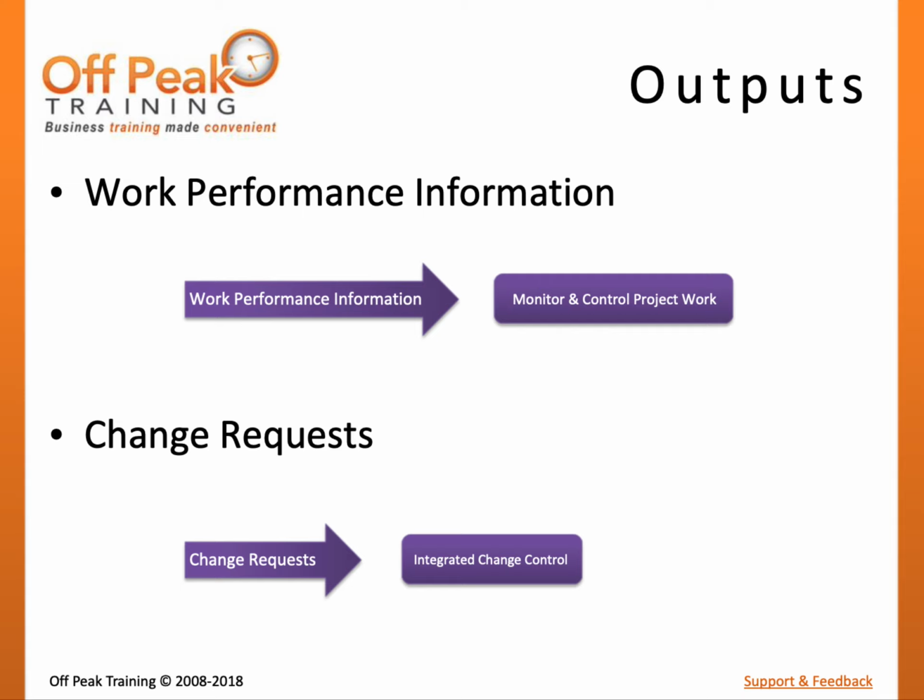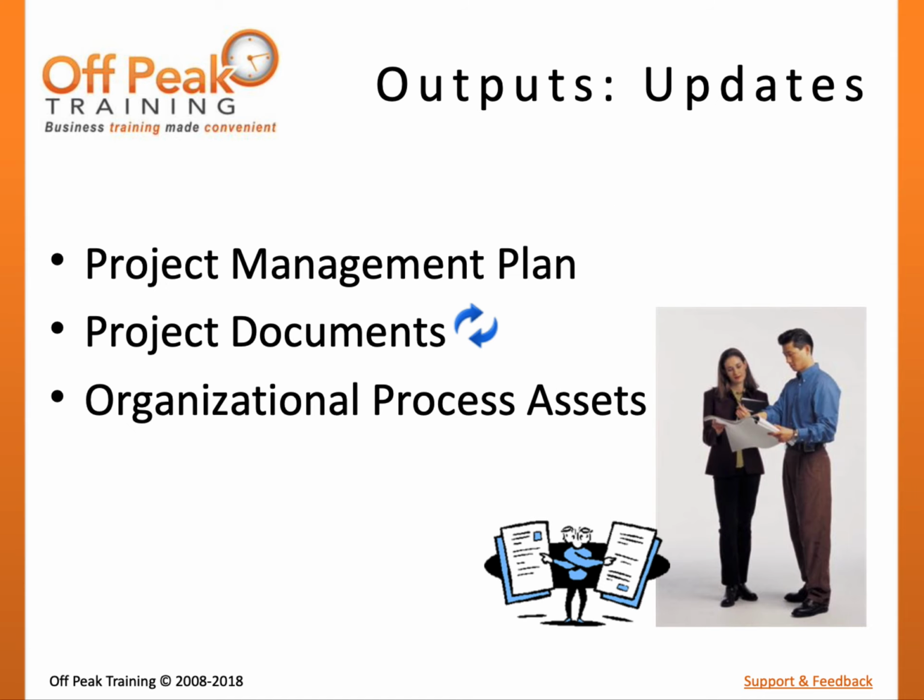Further, if accepted, there will likely be an impact to the schedule and cost baselines as well, and may lead to a new iteration of risk planning processes. The control risks process may also create additional project documentation and updates. The project management plan updates include changes to the approach of risk management in the risk management plan.